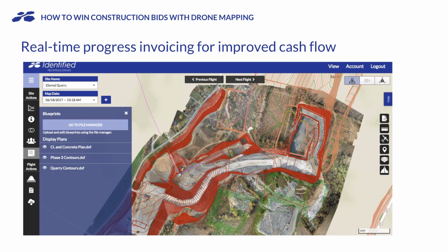But we maybe get to the end and we've been overpaid up front, and now we're doing the rest of the work for free because we've already received our income and the material is not moved yet. And we've had the flip side where we adjusted those factors, and all of a sudden we get to the end and all types of pay quantity left, but the material's already moved. So this just lets us know, where are we really at? Having that accuracy is more important than you can imagine.